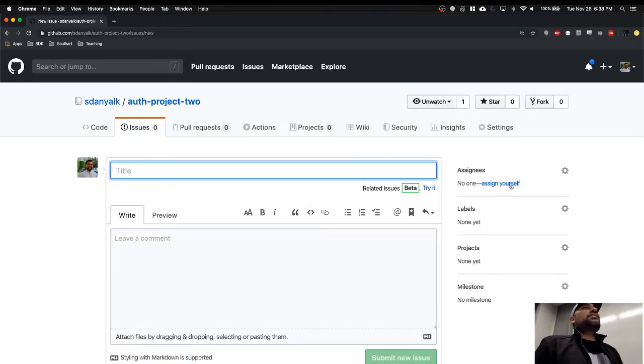Versus Kanban, where you have a list of tasks that you need to complete, like 10, 20, 30. It doesn't matter what the size is. You are going to complete them, and once they're completed, you go back and pick the other task, complete it, pick the other task and complete it, right? There's no specified deadline. The only deadline is your product deadline. Whatever your product owner or your company says, oh, we need to roll out this product by December or January, that's the deadline.